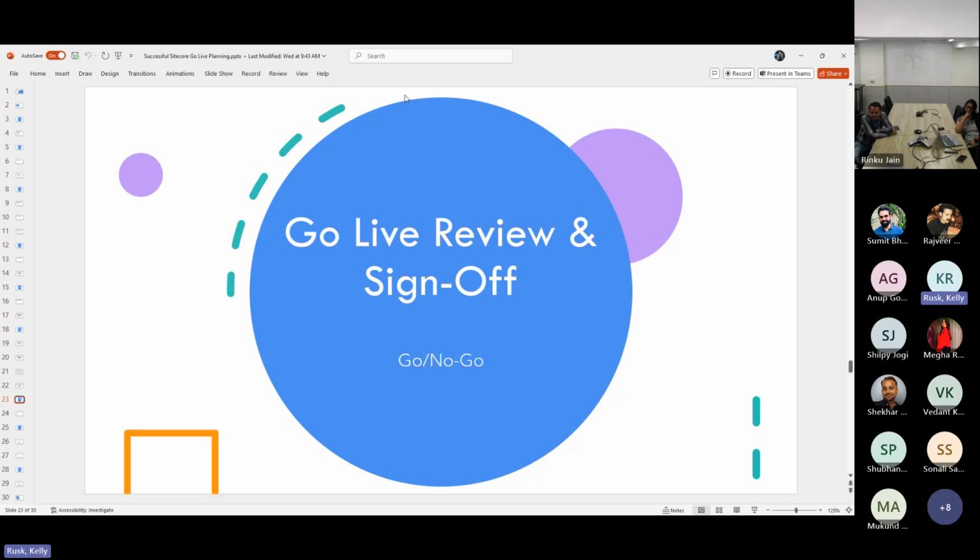That's going to really impact your go live. Do not forget about content migration. It's often left the last thing to do. It's painful. And if you don't think about it, you're going to end up in a world of hurt. So make sure that your content is migrated. And you might need to keep your content in sync across two environments.